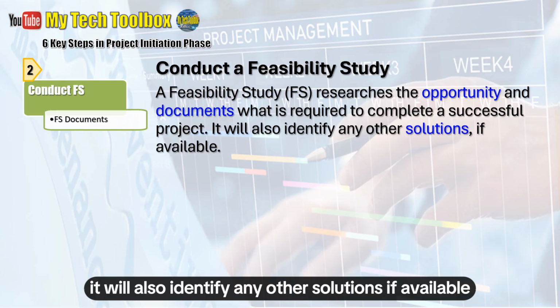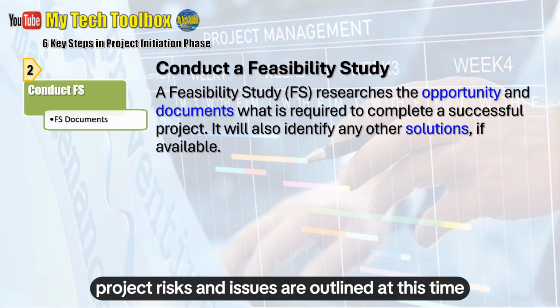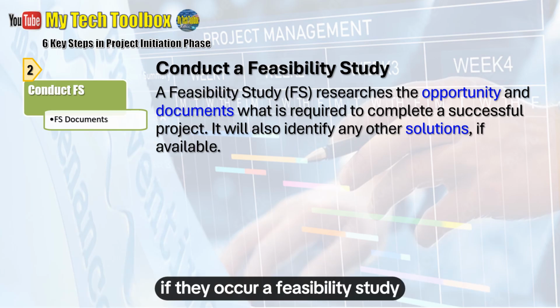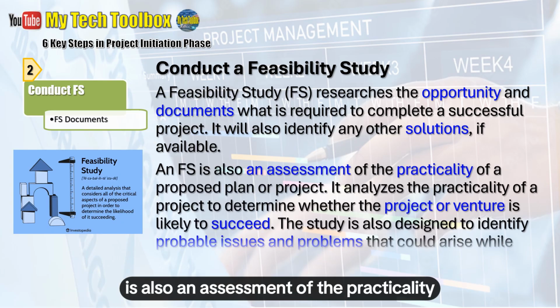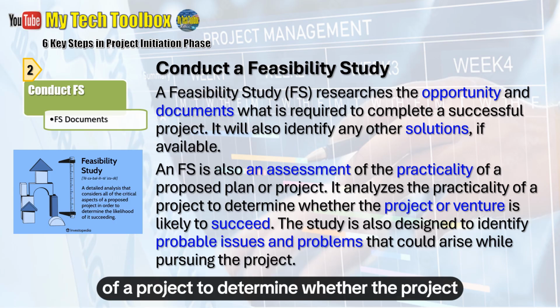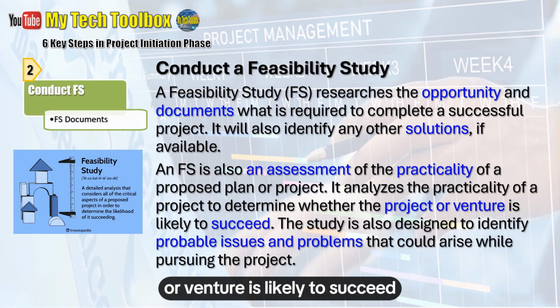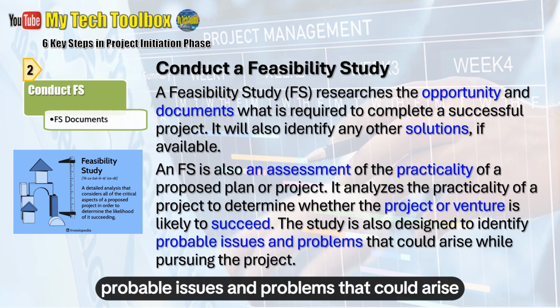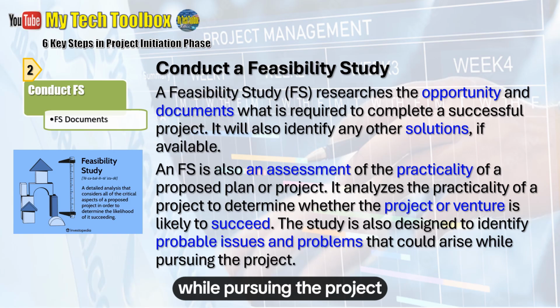It will also identify any other solutions, if available. Project risks and issues are outlined at this time, as well as what the proposed solution to each will be, if they occur. A feasibility study is also an assessment of the practicality of a proposed plan or project. It analyzes the practicality of a project to determine whether the project or venture is likely to succeed. The study is also designed to identify probable issues and problems that could arise while pursuing the project.